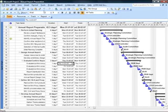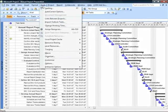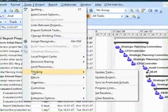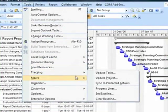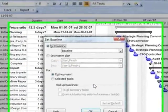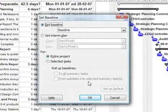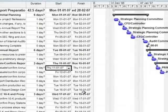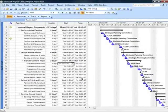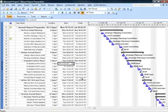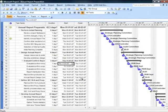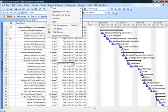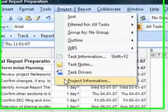So first let's understand how a baseline can be saved. I will go to Tools, Tracking, and I will choose Set Baseline. Just click on OK. Nothing happens to the existing project file. To see the impact of the baseline I will just go to Project, choose Project Information, and click on Statistics.